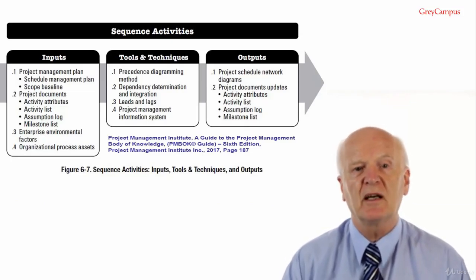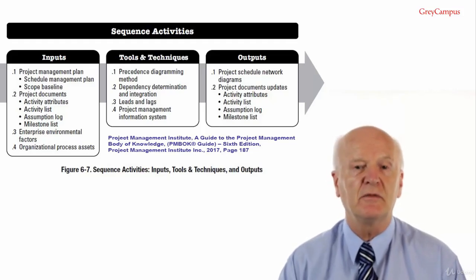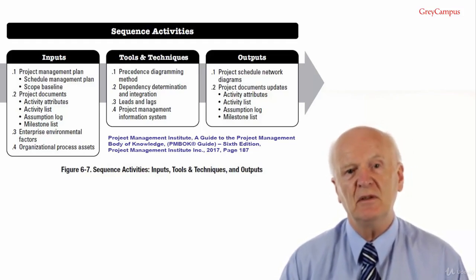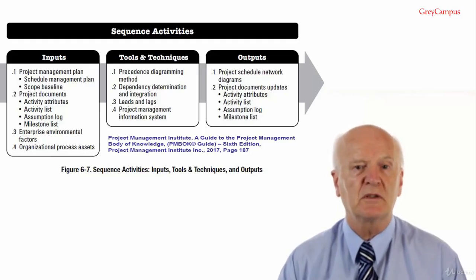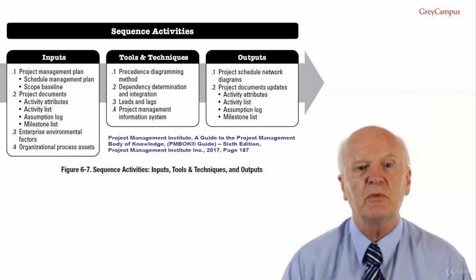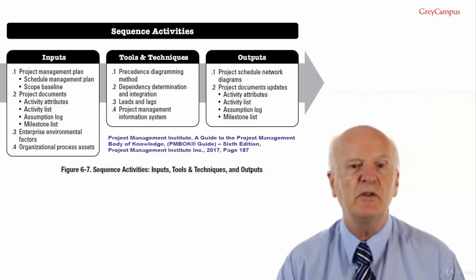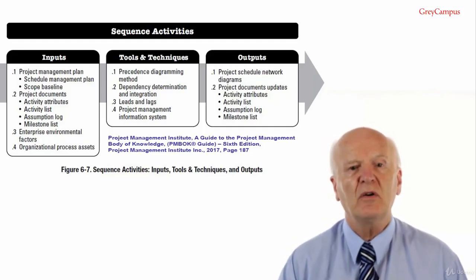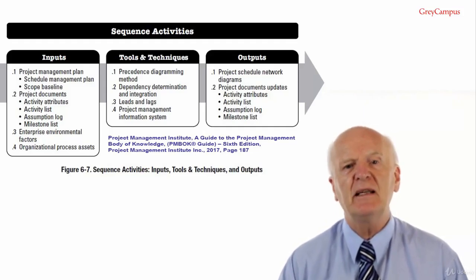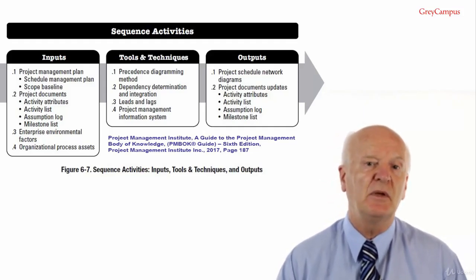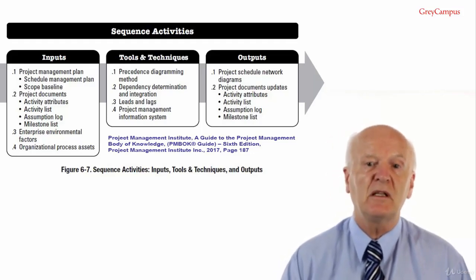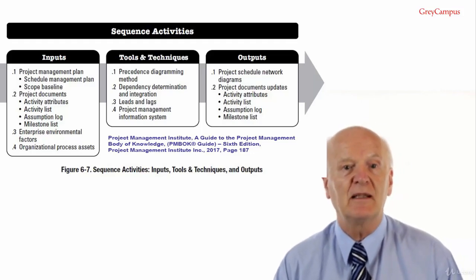A project schedule network diagram is a graphical representation of the logical relationships, also referred to as dependencies, among the project schedule activities. Figure 6.11 illustrates a project schedule network diagram. It is produced manually or by using project management software. It can include full project details or can have more summary activities. A summary narrative can accompany the diagram and describe the basic approach used to sequence activities. Any unusual activity sequences within the network should be fully described within the narrative.